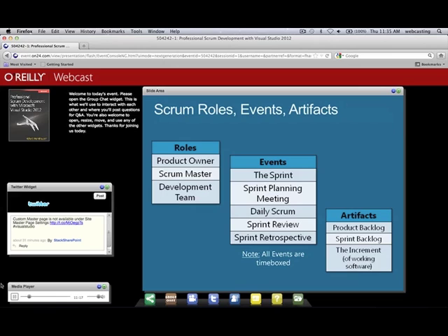At the end of the sprint is a retrospective meeting where the stakeholders go away, and now the Scrum team focuses on inspecting and adapting their own process, their own practices. So how can we improve how we do things in the next sprint? And that could include using or abandoning different tools or different techniques. Maybe we tried pair programming in Sprint 6 and we decided to throw it away for Sprint 7, or maybe we really liked it, so we're going to embrace it and suggest that more developers use it.